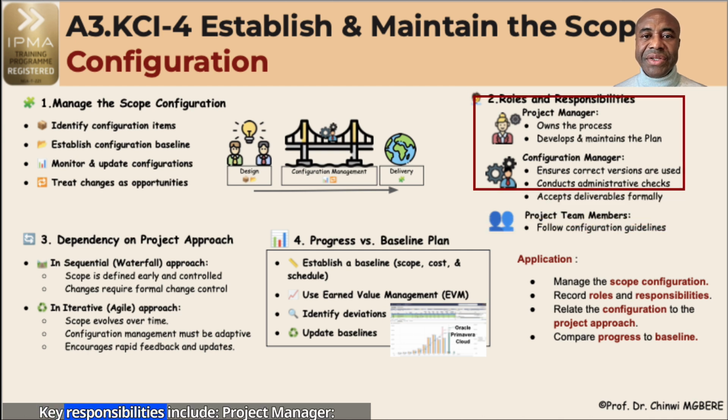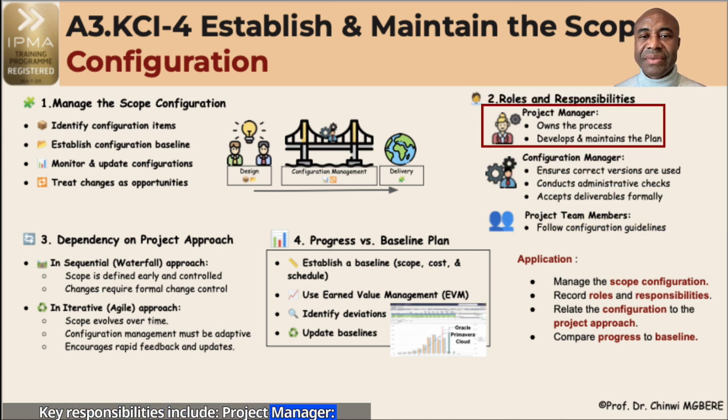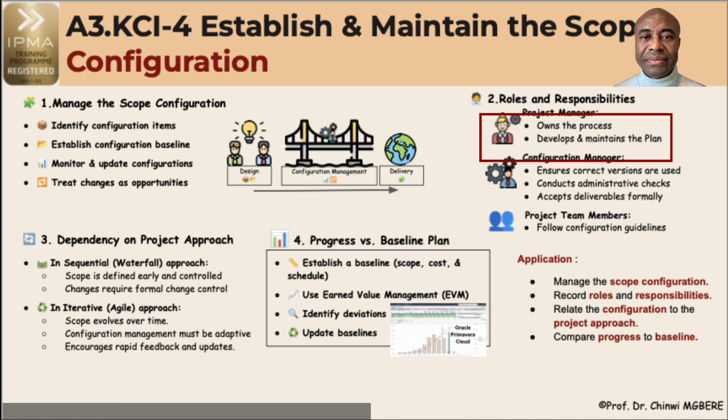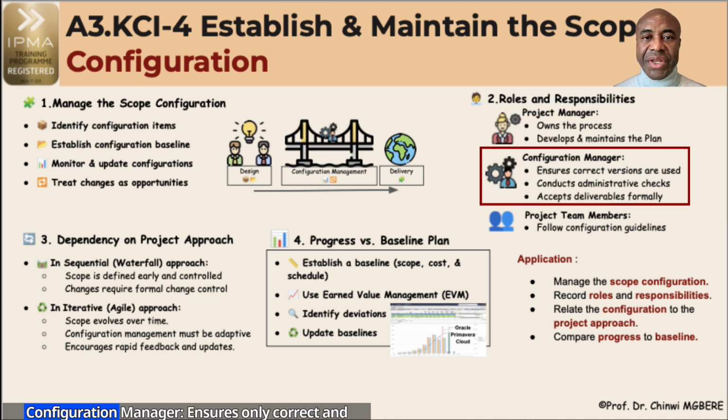Key responsibilities include: the project manager owns the scope configuration process, develops and maintains the configuration management plan. The configuration manager ensures only correct and approved versions are used, conducts administrative checks, oversees compliance with procedures, and accepts all deliverables formally, ensuring sign-off is completed.